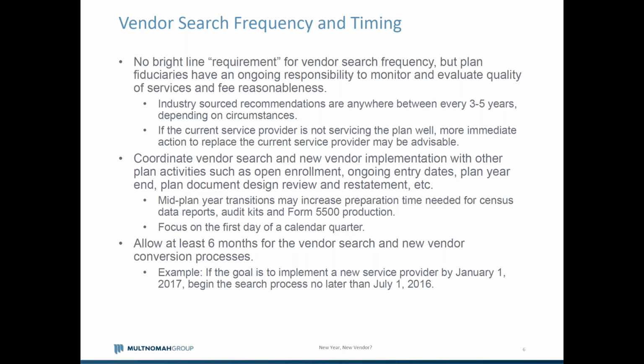And a lot of the timeline is dependent on your availability and the time you can spend on this. Certainly we've seen projects go longer than 6 months, and I think if there's a good project plan, it could be spread out and ease the burden a little bit from a time perspective. It's pretty hard to do anything in a shorter time period than 6 months and do it effectively.